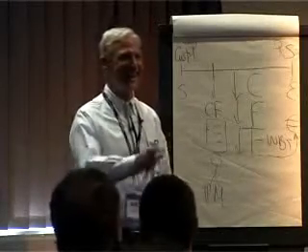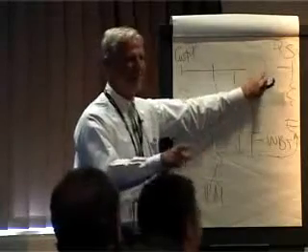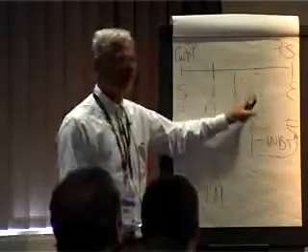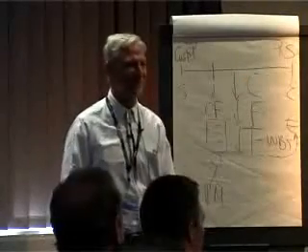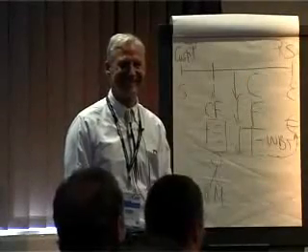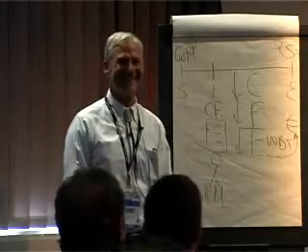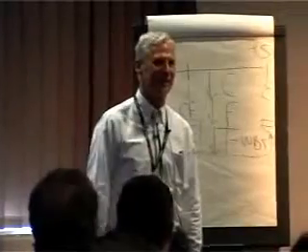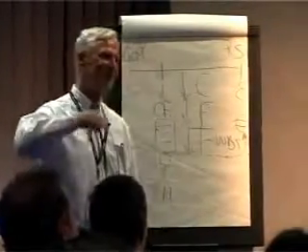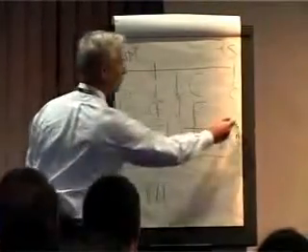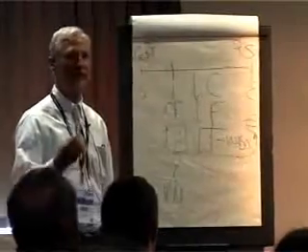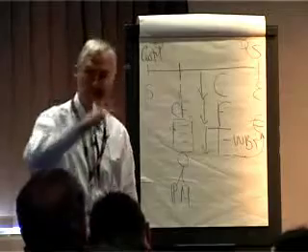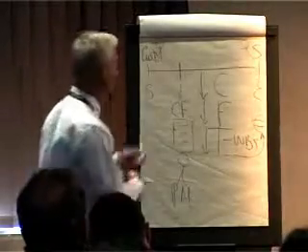Okay. Yeah. Now, you're big boss in the outsourcing company, and you give him quite a big bonus if his portfolio of projects are going on. Ask him how his project's going on. How's that project going on? No problems, smooth sailing. Yeah. I call this green shifting, if you're familiar with red shifting in physics. So it's this green shifting that goes on, and it's strongly related to the presence of incentives when things apparently are going well. So there's a reduction in transparency.